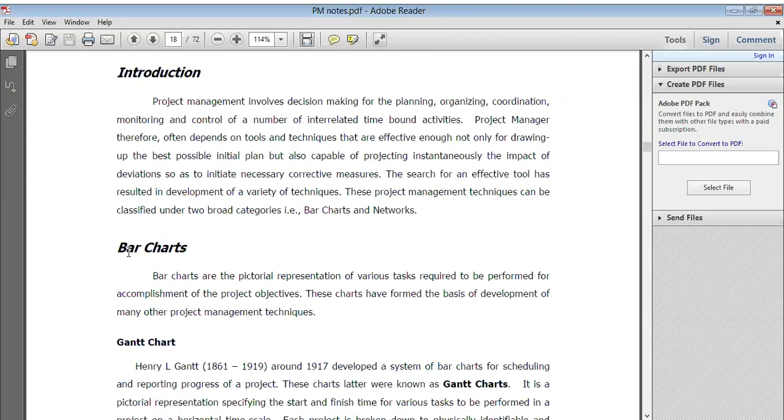So it is added when the project is completed, at that time some of the materials you require, for example steel, iron, and the rate of tolerance is different. When you prepare the budget, at that time you take 5 rupees per meter or 5 rupees per bar. And when you started the project, the cost of that bar increased by 1% or 2%. So that is the impact. So that kind of justification you need to mention in your project report, right?